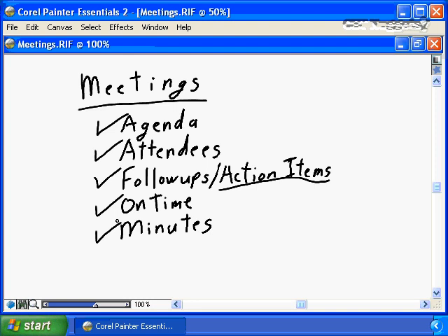Meeting minutes that are published a week or 2 weeks later are virtually useless. By then, people have forgotten the core of the meeting and cannot validate that, yes, in fact, these minutes do reflect my understanding of what conclusions we reached and therefore are meaningful and relevant for your project.